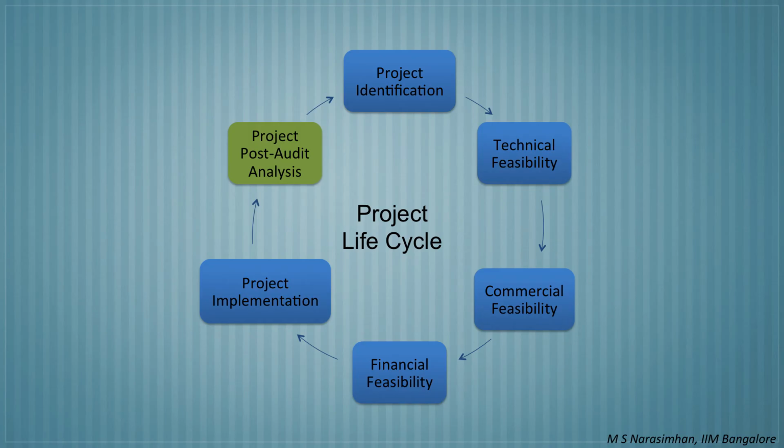After a few years of execution of the project, and once the cash flows start flowing from the project, a detailed post-audit project note is prepared. The purpose of this audit is to learn from past experience of project preparation and execution, and such experience will be useful in taking up future projects.